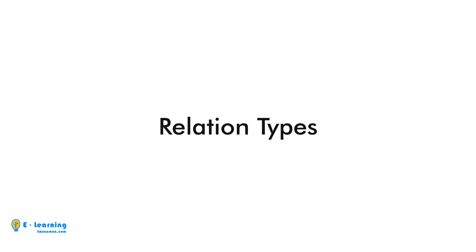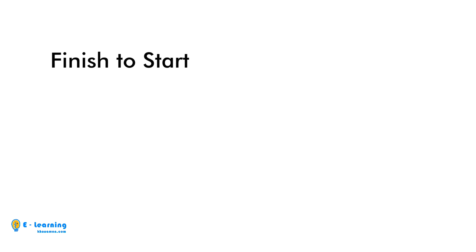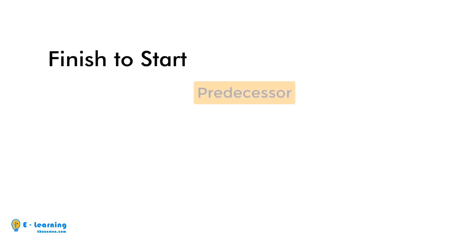Let's explain relation types with diagrams. Finish to start: Predecessor must finish, then the successor can start.